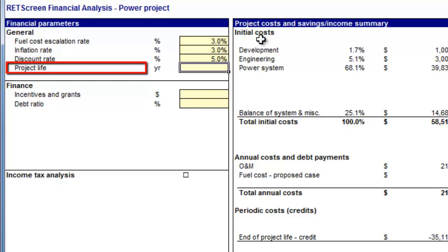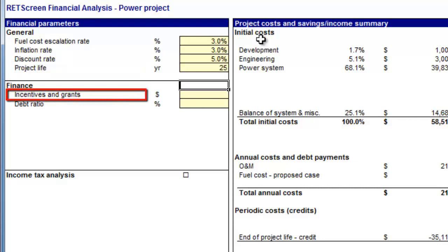The project life of a solar project is typically 20 to 25 years, but depending on the scale, type of equipment, and environment in which the project operates, could be as low as 15 years or even much higher. Projects operating in harsh environments may dictate a shorter life. In the context of our project, with easy access for maintenance, regular monitoring, etc., we can expect at least 25 years. We will later look at the impact of an extended project life of 50 years.